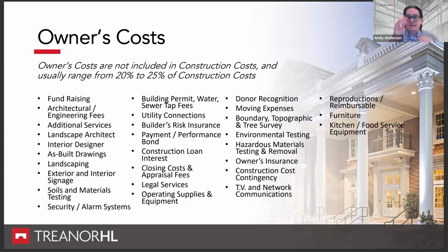But including the higher contingencies earlier in the project allows you the flexibility as the project moves forward. You can absorb some of those eventual increases in the estimates as the project gets closer to start, without having to do major changes to the design late in the game and really disappointing all the stakeholders who have bought into this project. So it's really just insurance against that risk. All right, next slide.